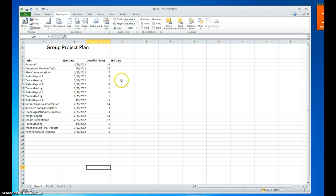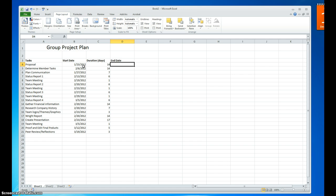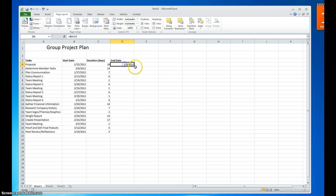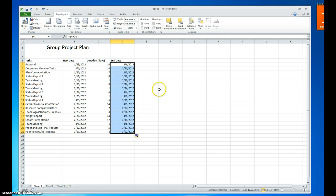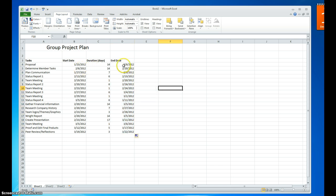We're also going to calculate the end date, just so we have a basis for beginning and end in regards to date. The first thing we'll do is hit equals, the start date plus the duration, and that will give us our ending date. Since we have that first one, we're going to copy this down for the rest. Now we have a start date and an end date for every task in the list.